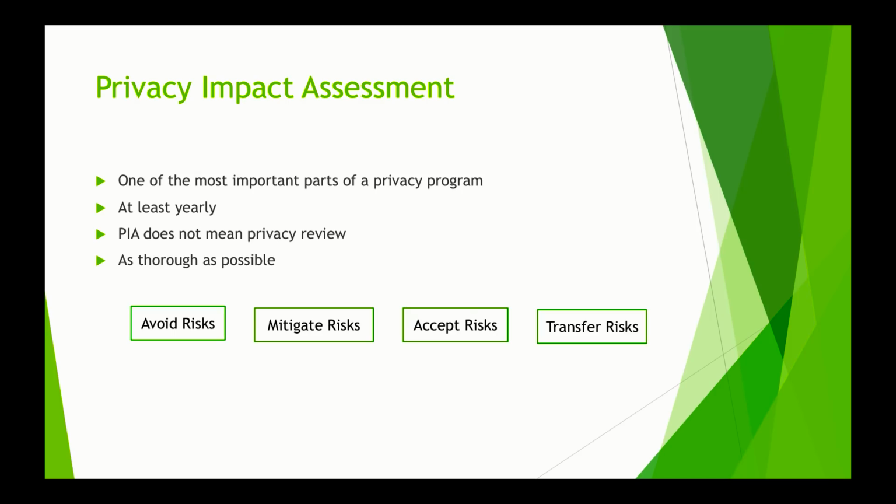Accept risk. The organization can decide that it would be too costly to use a third party to process its credit card transactions or to modify systems to encrypt the numbers. It may instead rely on current practices to protect the credit card data and hope for the best. Or transfer risk. The organization can purchase business insurance to cover the firm in the case of a data breach.